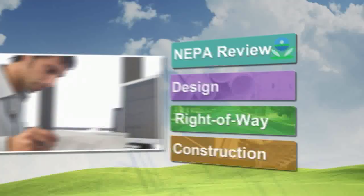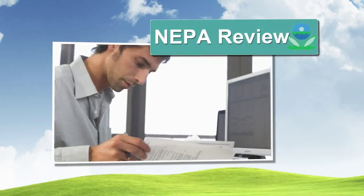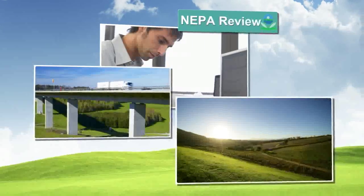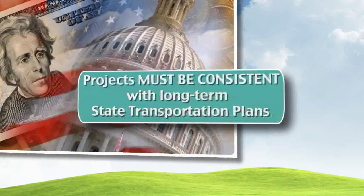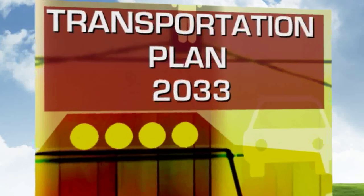The NEPA process is one of the main activities of the preliminary engineering phase to assess the project's environmental impacts and obtain FHWA approval of the project's environmental document. To be eligible for federal right-of-way funding, a project must be consistent with the long-range plans that provide a comprehensive blueprint for state transportation needs 20 years into the future.